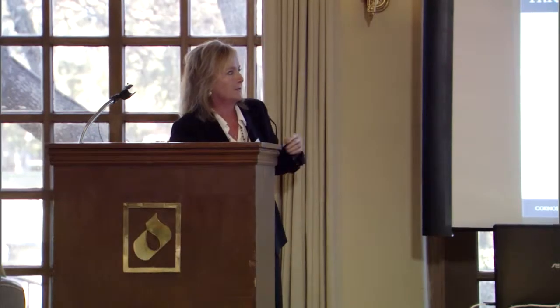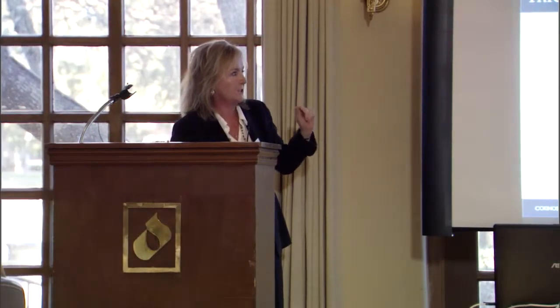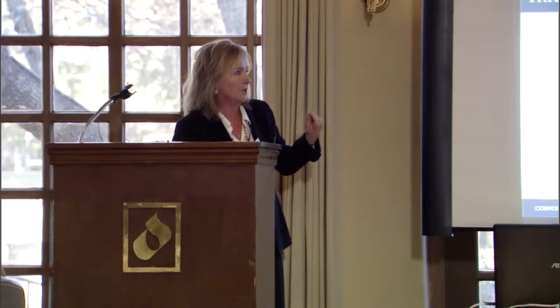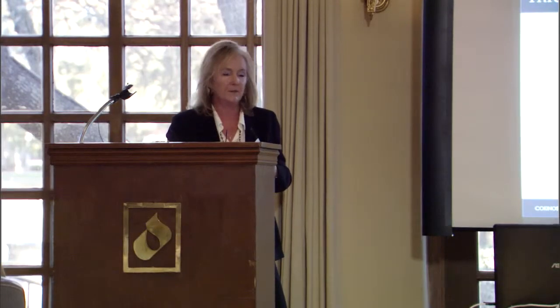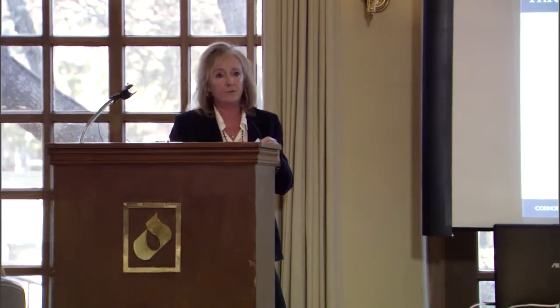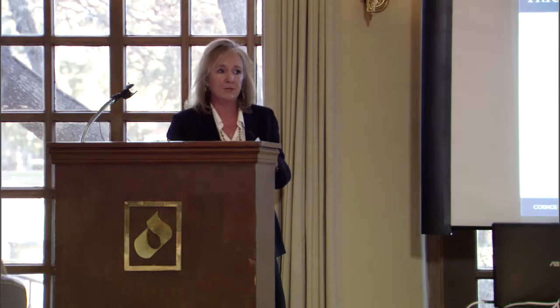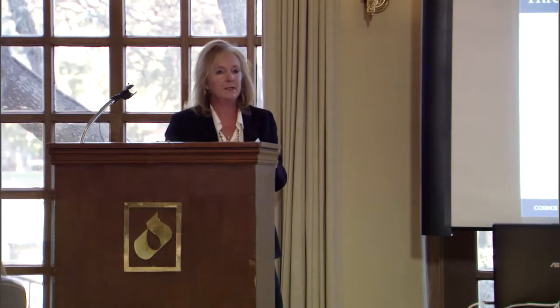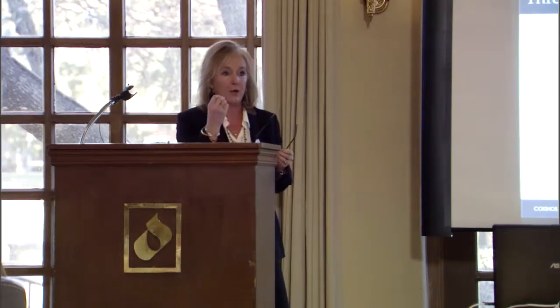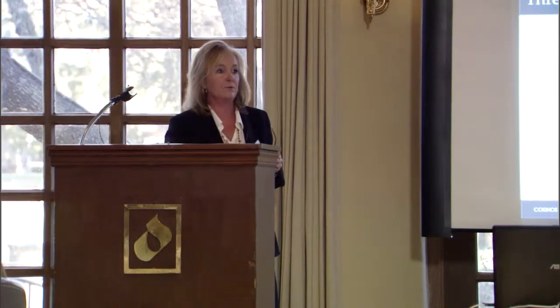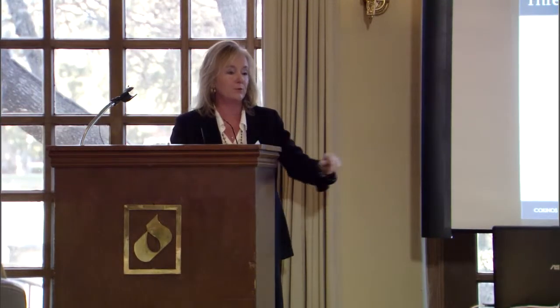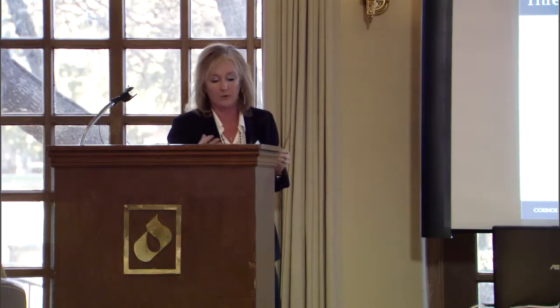The key with the 2nd tier is you've got to send that 2nd month notice. If you fail to send the 2nd month notice, your lien will not be valid. The courts are real lenient on the form of the 2nd month notice, but you have to send notification. And really it makes sense. The purpose of the notification is to have that owner trap the funds, so they don't go and pay out their retainage to the general contractor or otherwise.